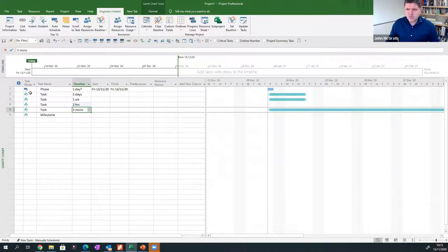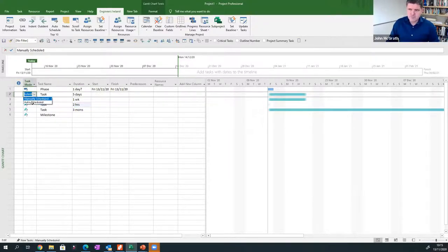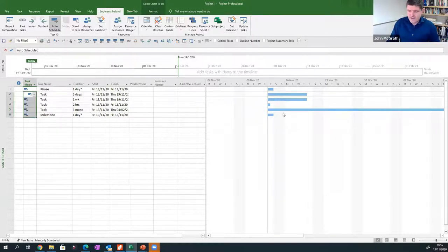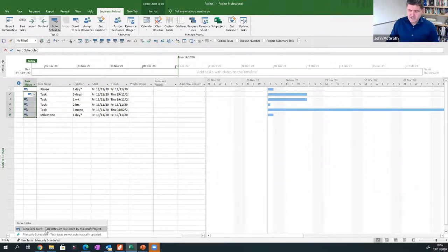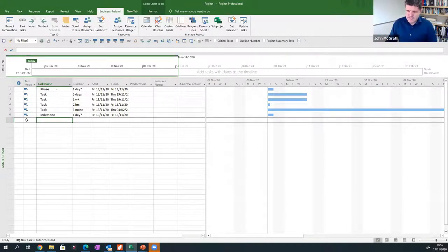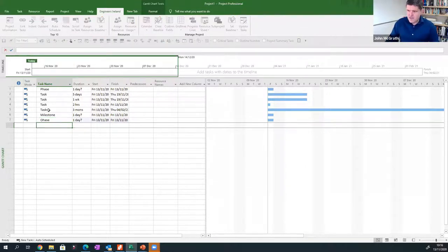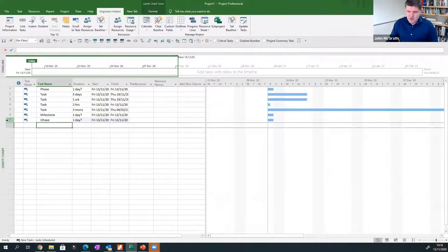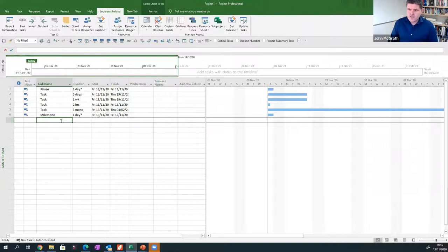The key thing here comes back to the manual scheduling issue visible on the left of the screen. You can change it one at a time, but much better to drag down all activities. Rather than doing that every time, what I'd normally do is change the global settings to auto-scheduled — that means from the word go I'm using the full scheduling capabilities of Project. If I enter another activity now, it picks up manually scheduled again. I want fewer rows on screen to see functionality rather than more rows.